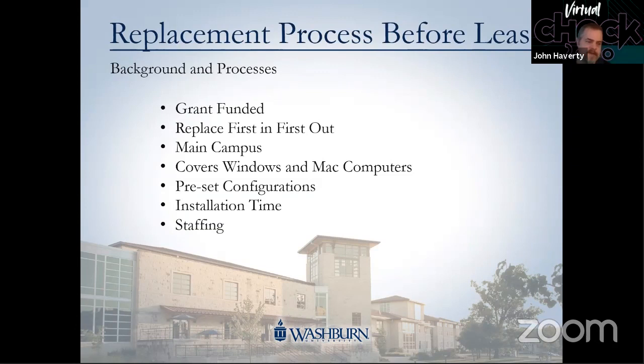Usually prior to this, our installations were, as I mentioned, anywhere from 150 computers to maybe 300. So it was manageable. We could do it all within just a few months. We tried to do it between, they'd arrive in July typically, and we try and have those all done by December. Usually not an issue at all.